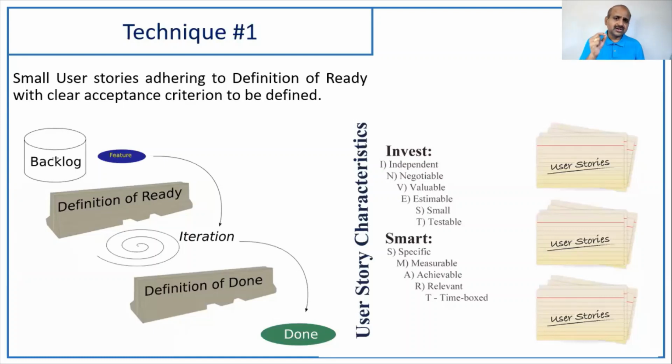So what happens is it results in low productivity, low velocity, right? So it's important, my friends. If at all a story is not meeting the definition of ready, that means the story should have the INVEST principle. That means the story should be independent, in terms of the smallest possible thing. It should be negotiable. That means people should be able to negotiate on the value that the story is bringing to the table, and you should be able to negotiate why this, why not that, in terms of prioritization. It should be valuable. And you should be able to estimate in such a way that it's small enough that it can fit into one sprint. And ultimately, the acceptance criteria are testable.